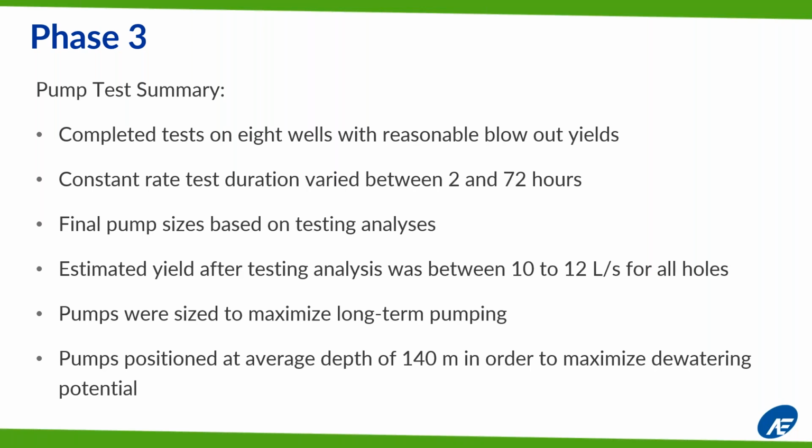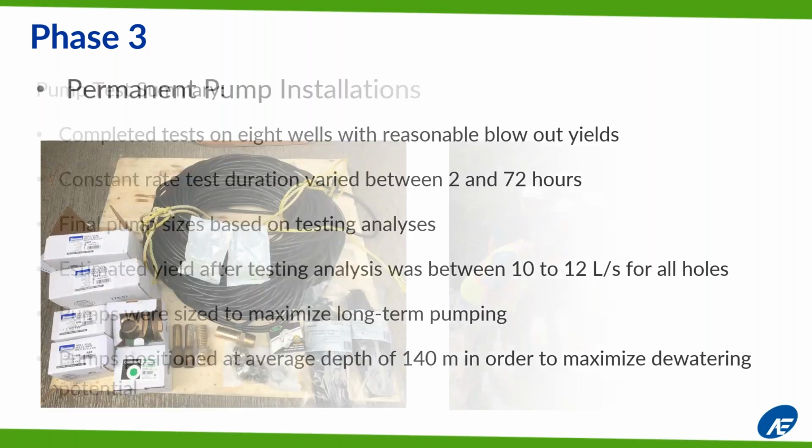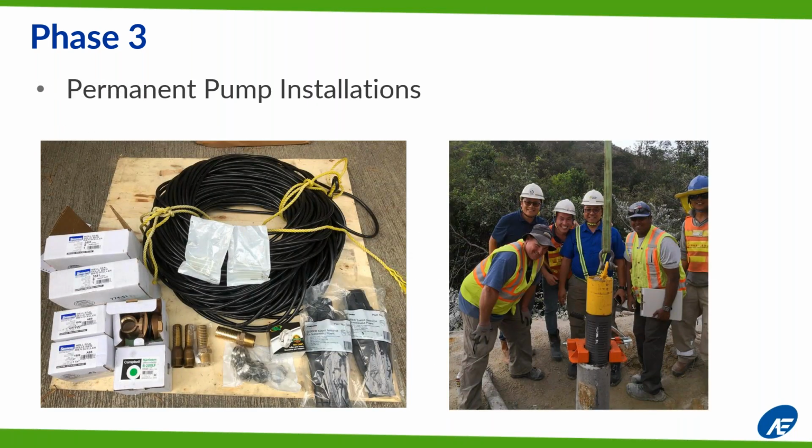The pumps were positioned at an average depth of 140 meters in order to maximize the dewatering potential of each hole. The majority of the materials that we sourced were from North America, so we had everything shipped over, and when we arrived, we were able to help the client and their team put everything together and install the permanent installation.